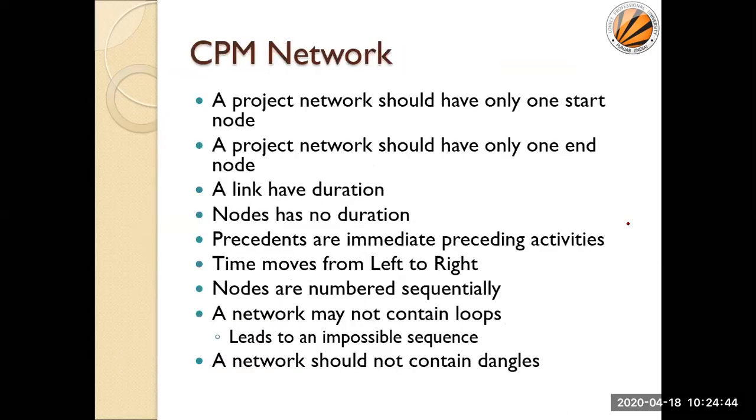That's why I am asking you to learn this. Here you can see a project network should have only one start. A project network should have only one end. Okay. So these are the conventions, these are the rules that I have to follow. Clear with this? Yes, sir.